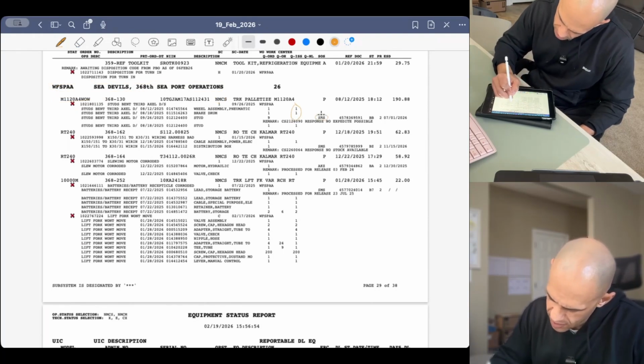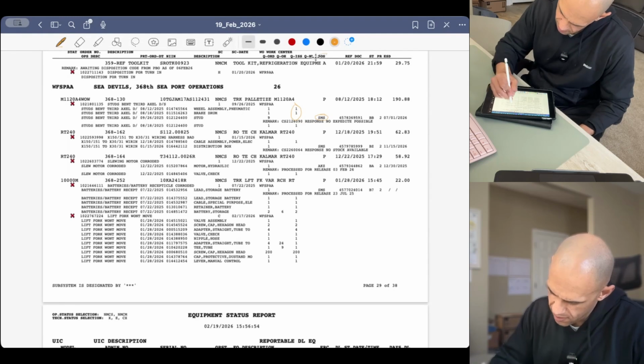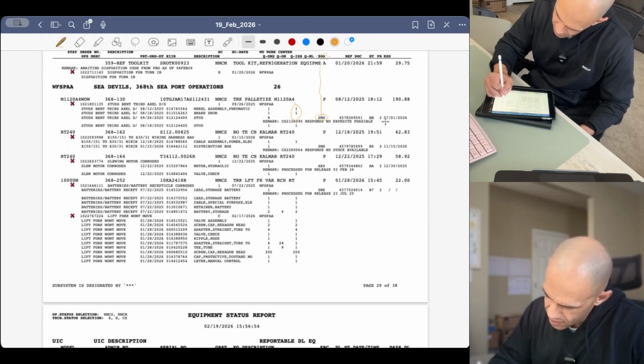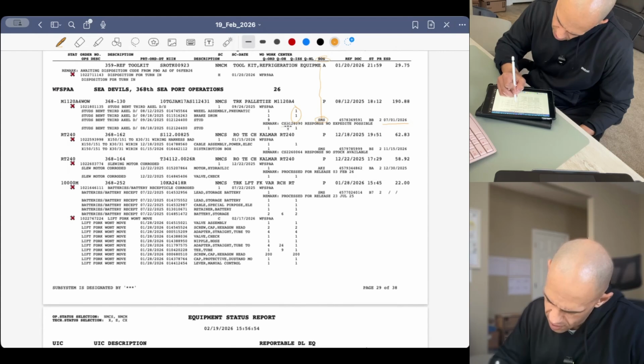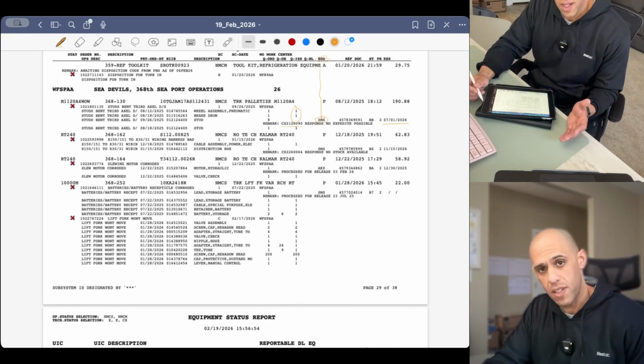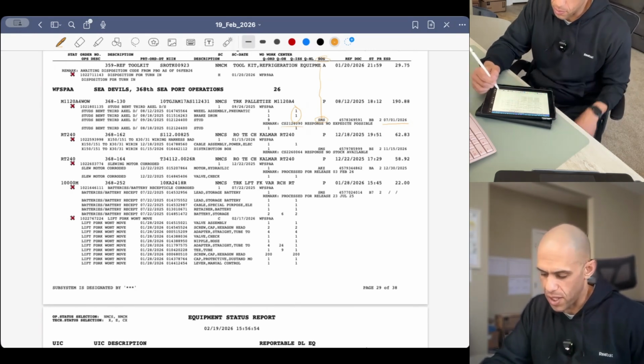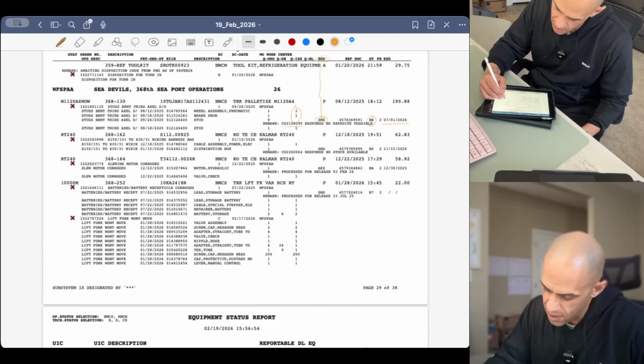And we identified that the source supply, SMS, is our source supply, and that it's past 30 days out, and they submitted a SAR. So one thing they're missing here is the SAR number. So it says that is our CS210 response. So anything that's NMCS should have some type of remark. If it's BA, BB, it should have some type of remark, even if it's BZ or B7.